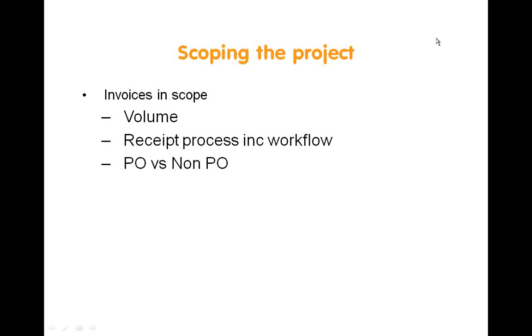Again, just in terms of scope, you might want to leave non-PO out of scope for now. That's up for debate. We're familiar with organizations that have converted non-PO very, very nicely, but people would generally agree that the PO invoice area is the good area to start with.